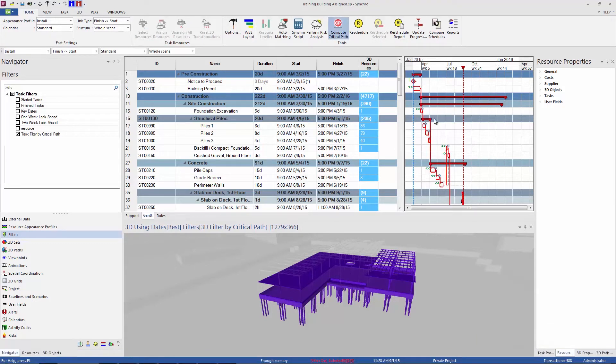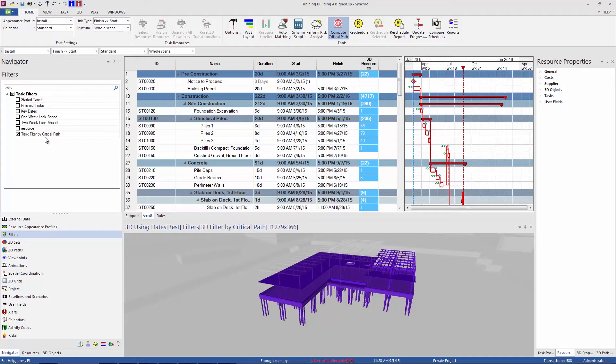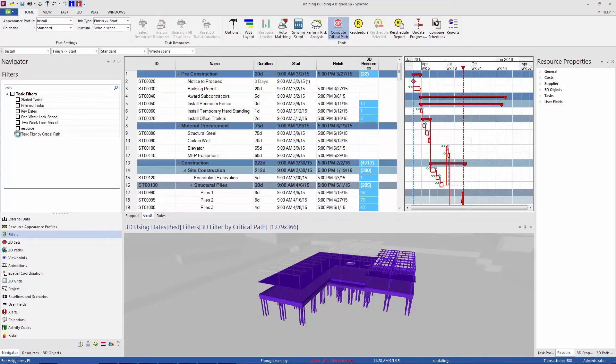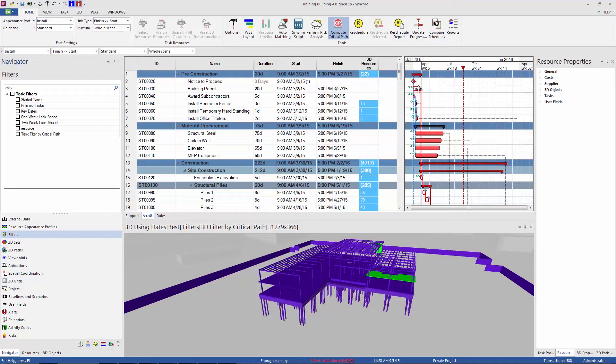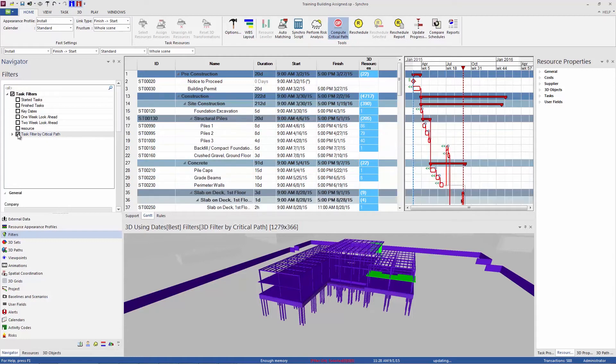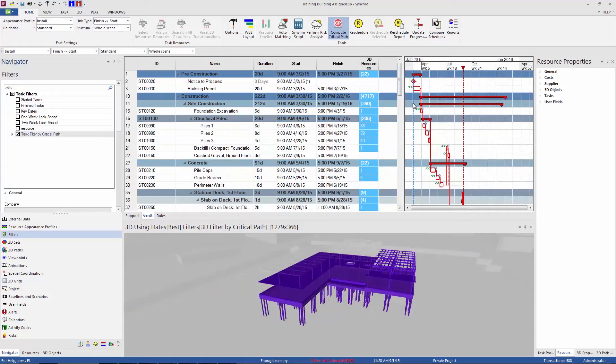So now we know that this critical path is up to date. And the critical path is all of these tasks that are outlined in red. You can see, if I turn this filter off briefly, the non-critical tasks are the solid color and the critical ones are outlined in red. So I'll turn that back on. So now we're seeing just critical tasks, just tasks that are on our critical path.